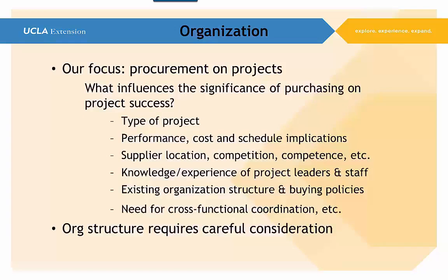If you have purchasing involved in your project, the influence is probably very, very significant. But it does depend on the type of project and what your scope of work is, what your statement of work is, what your deliverables are, how it's going to impact the performance, cost, and scheduling. If you're doing subcontracting where a major portion of your project or your work breakdown structure actually goes out the door in a subcontract, then it may have an influence over you where it's almost like the tail is wagging the dog, and you need to make sure you understand the significance of the relationships and the influence and how procurement actually is involved.